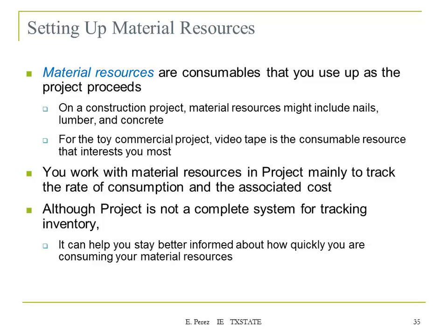You work with material resources in project mainly to track the rate of consumption and the associated costs. Although project is not a complete system for tracking inventory, it can help you stay better informed about how quickly you are consuming your material resources. There are other software packages that are more related to this type of thing, but you can still use project to define the material consumption.